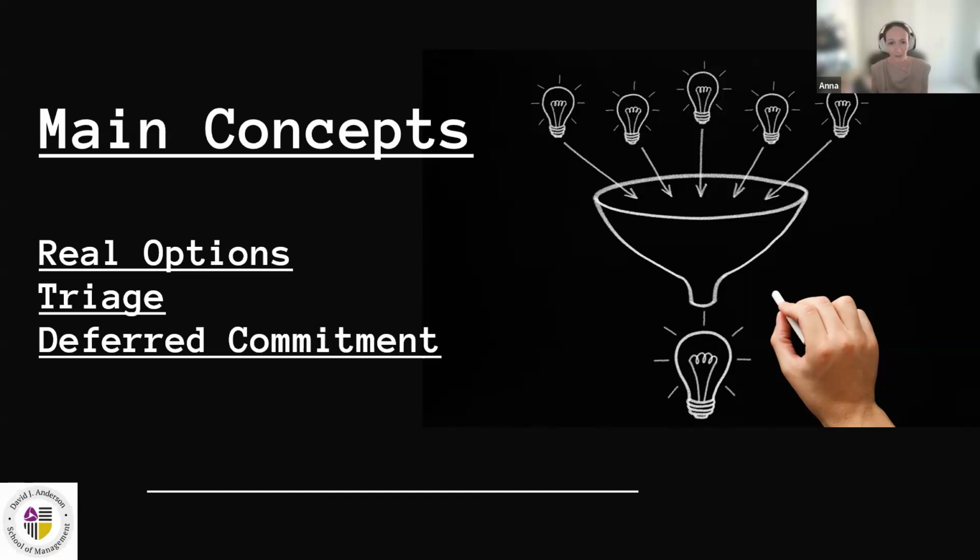Then the next concept is triage. We apply triage because we normally cannot do everything. We have more demand than capacity to fulfill this demand, and this is where we apply triage. This is the decision about the urgency of work, what should be done now, what can be delayed, and how fast our item is metaphorically bleeding to death, because we borrow this concept from the battlefield and then from the medical arena. So this is the decision about urgency of work and when we should start working on it.